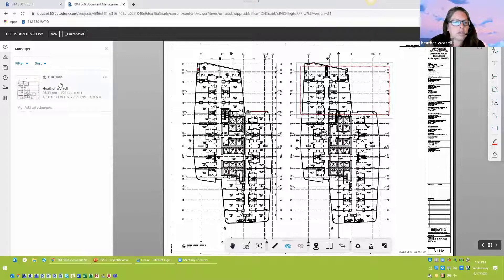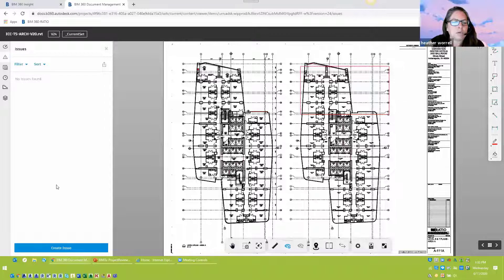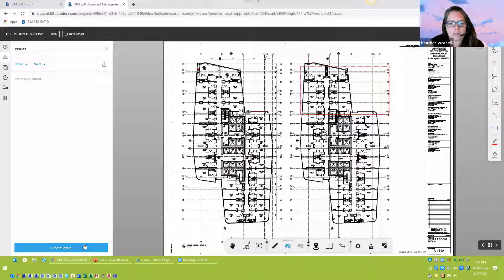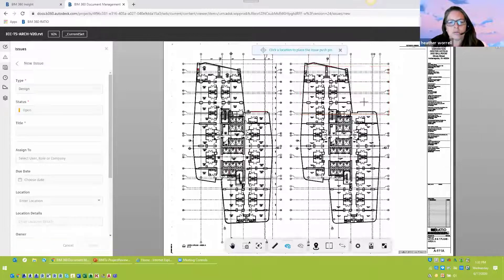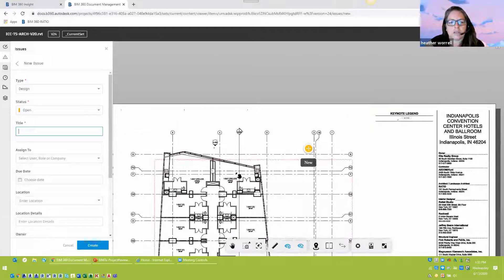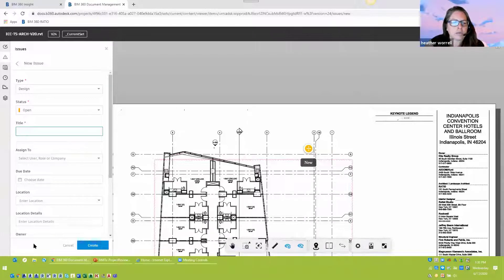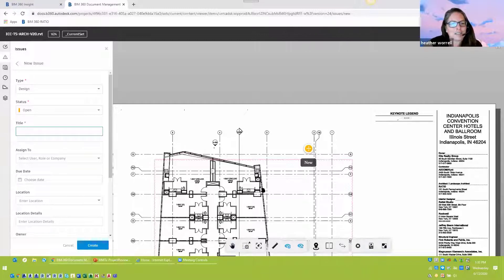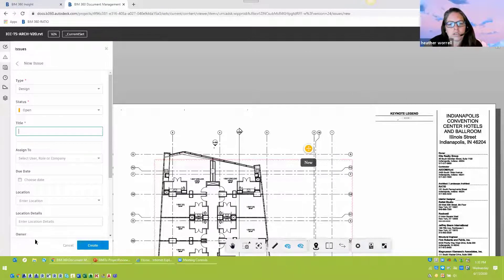There's another thing called reviews, which I haven't done yet. It just seemed like one more step that I didn't want to make everybody take. And so that has to be made public so that everybody can see it. And so the issues. So that's done. You can see that it's published. The issues is a separate thing. So what I've been telling people is that if you make a markup on a sheet and you want somebody to be assigned to it to go fix it, then you have to make an issue to match that markup. So it's a little bit of double work that you have to have to assign. So that's, it's unfortunate, but it is what it is.